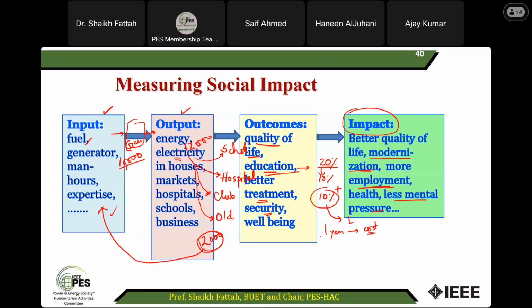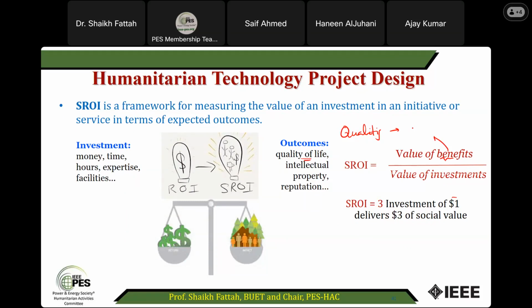These things are very critical, but at least we can understand that they can save 1 year of money as well as go to the market 1 year faster. Maybe they can add another $1,000 or unit if you can reduce that. So that is the way to quantify the qualitative benefits.